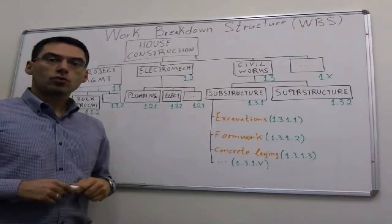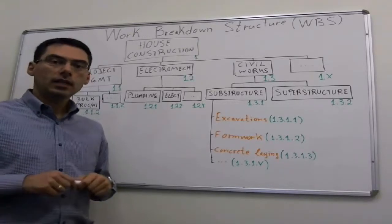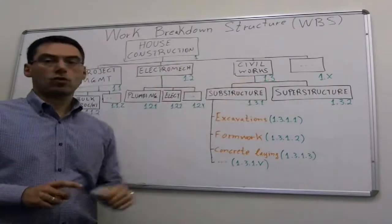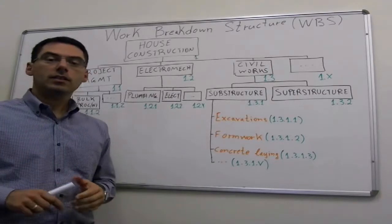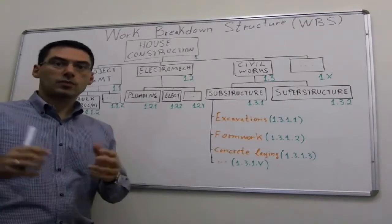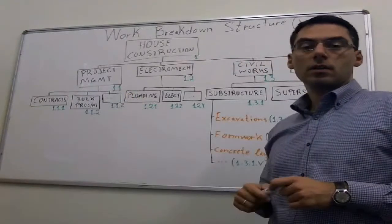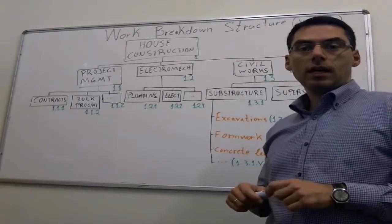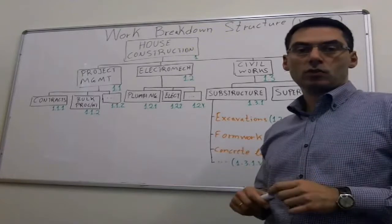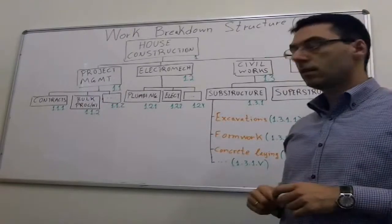The work breakdown structure should not be confused with the product breakdown structure. Although the work breakdown structure is good to be deliverably oriented, it is not the product breakdown structure. These are not the components of the house that we are building, but it is the work that we do in order to build a house. We have to bear in mind that there are some work packages in our work breakdown structure that are not referring to a particular piece of our product such as project management, contracts or bulk items procurement.